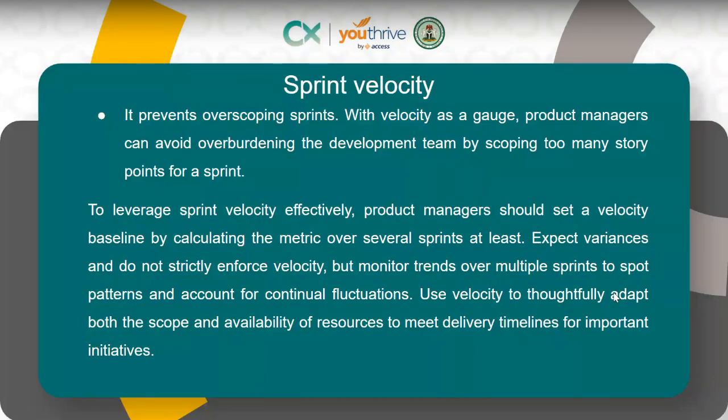And you know that you are not adding any more that will make them feel overburdened. Because you're trying to meet a certain deadline, by the time you add all of the story points for the user stories given to that engineer, it's almost getting to about 15 to 16 or even 20. And that's overload for an engineer.